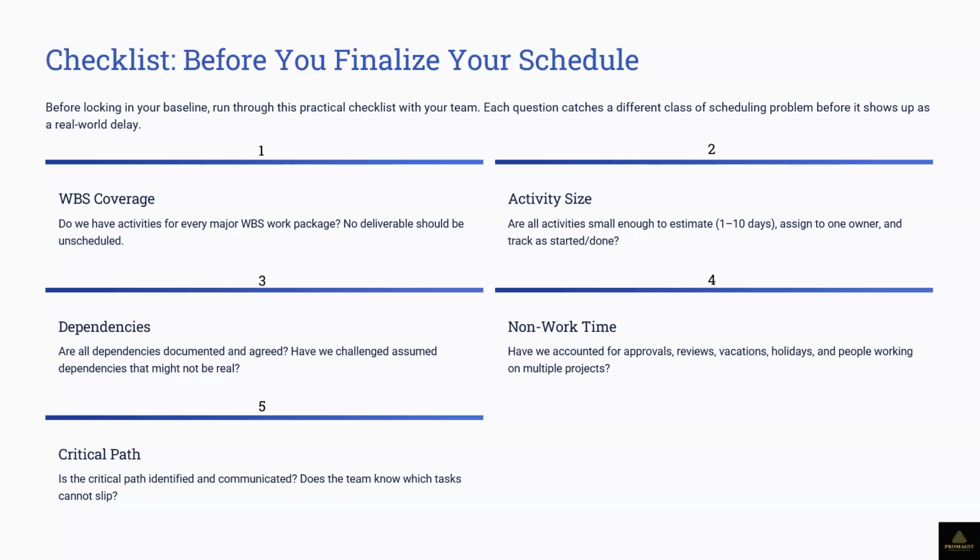It depends on the way the project is, and there'll be holidays, non-working time. So you have to go there and mark the days that are non-working days so that they don't show up in your schedule. It's a big deal. So like I said again, if you really want to learn that, please reach out. It's a job on its own. Scheduling is a job, and I can tell you the jobs are out there for schedulers.